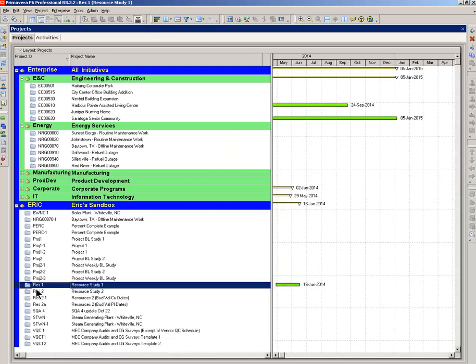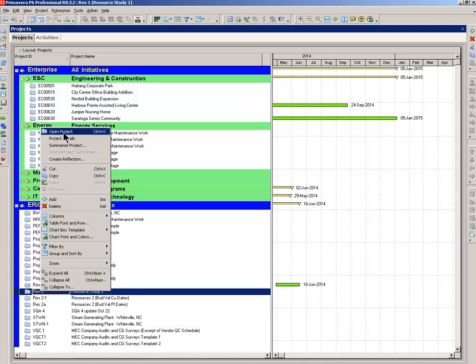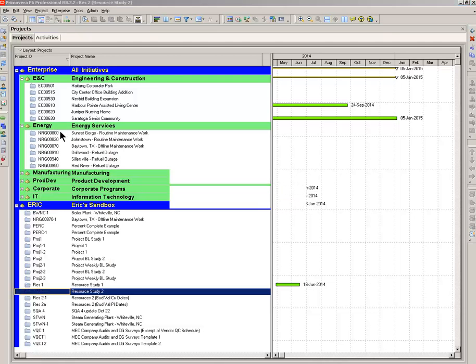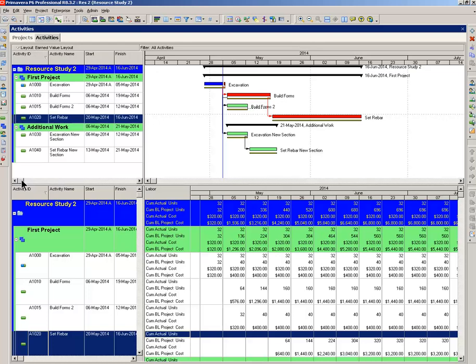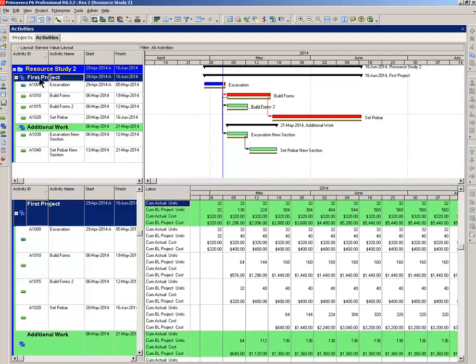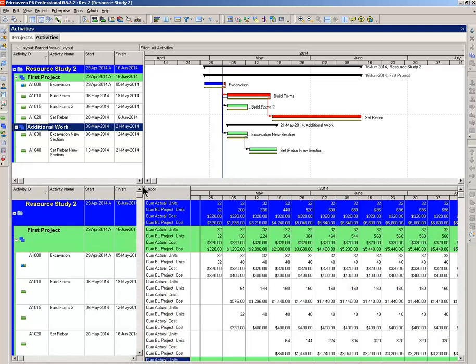On to the second project or the revision of the first project. Loading. Let me reset this thing. On the WBS in green, you can see the first project. That's four activities. And for here, there's additional work. Trying to keep things simple. All I did was add two activities to the project. And so we're going to call this a revision of the first project. So looking at this activity usage spreadsheet, we're going to have some changes in the cumulative baseline project costs and the cumulative baseline project units. They will go up in accordance with the hours that are into these two activities.